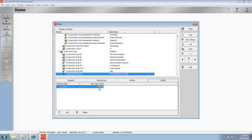A second way to assign maximum units per time is to use a custom role limit. If you use a custom role limit, then you can type in the maximum units per time.